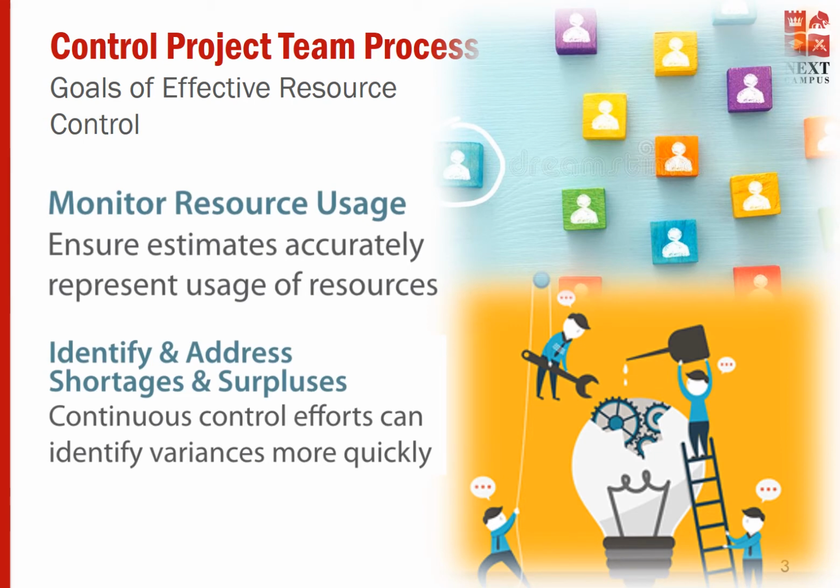First, one of the key goals of effective resource control is to monitor resource usage. As you know, when it comes to a project, there are a lot of resources involved and engaged and used by the project team. So it's quite essential that you monitor the resource usage. For example, if you have a 10 developers team, you need to look at their actual utilization. Are they fully utilized? Aren't they utilized enough? Are they spending overtime? Is there any room for someone to contribute more than the person does at this point? All these questions will be very crucial for a project manager to manage the project.